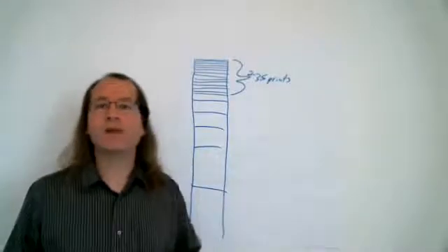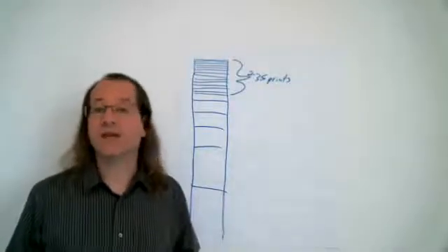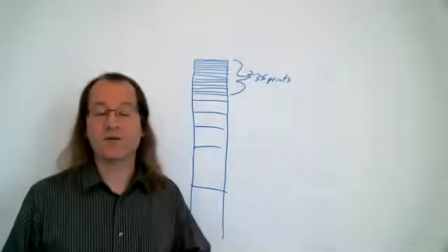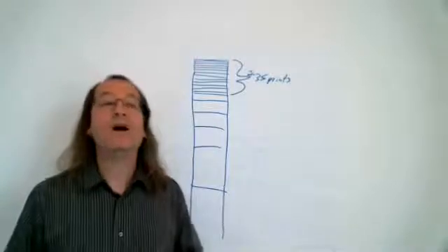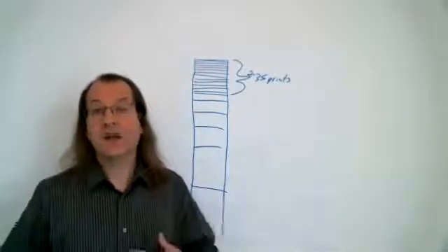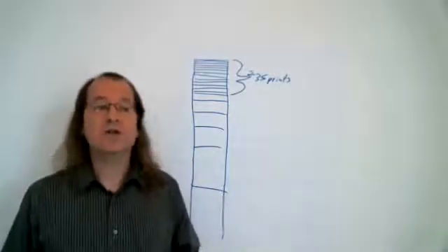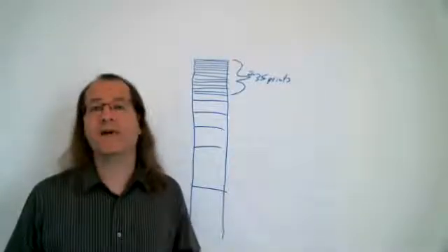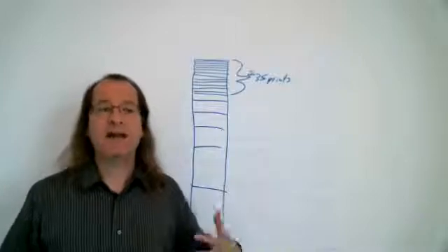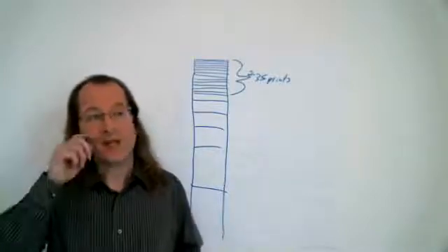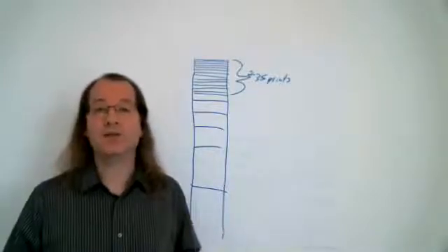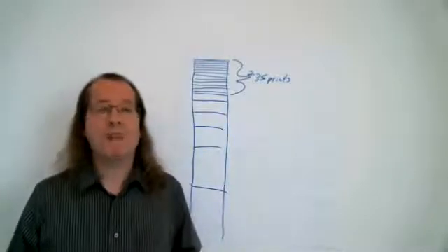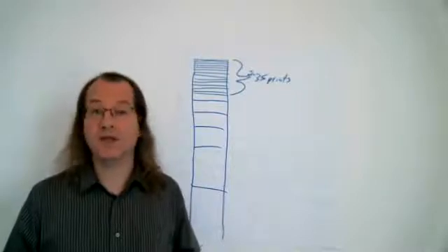The Scrum Guide recommends that teams spend perhaps 10% of their total time every week on product backlog refinement activities. One common practice, it's a practice that I strongly recommend, is to every week hold a 1-hour product backlog refinement meeting and have the whole Scrum team there and a few hand-picked stakeholders, and we're going to kind of walk through how that works. So this meeting, by the way, has been known by many names over the years.